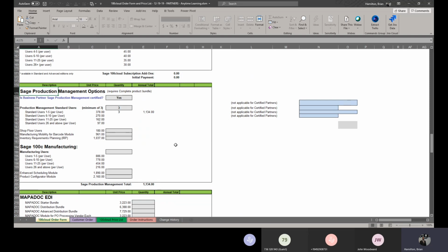Okay. For the amount of users, do as much as you want, right? Yeah, for the amount of users that you have, I don't envision that you would need somebody on site to do any of that. But in terms of the length of the project, usually you drive that. It's based on resource availability. We're mindful that you have a business to run. So during the beginning, there's a project timeline that's set out, and there's meetings that are scheduled, and certain things happen on certain days. So we kind of stick to that. But you control the speed at which this happens. In the first initial meeting, you tell your consultant when you want to go live, and then they'll work backwards and schedule things to accommodate that go live date that you set.